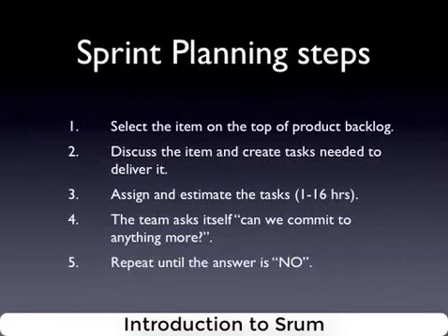They might ask the product owner some questions at this point, and they try to really preliminarily design and imagine what tasks will be necessary to deliver that particular backlog item. Those tasks are captured on the sprint backlog in the form that I have been showing you in my example. They can be assigned, which means people can volunteer: okay, I will do that task, and someone else will do the other tasks. Sometimes all the tasks for one item will be done by just one person. That depends on the domain, and also depends on local customs of the team.